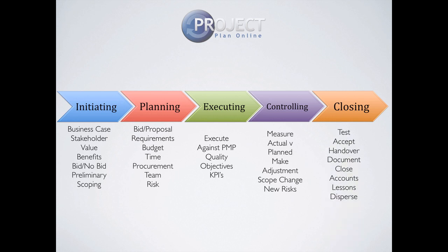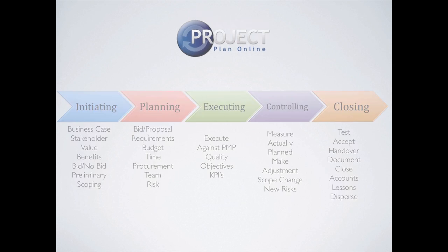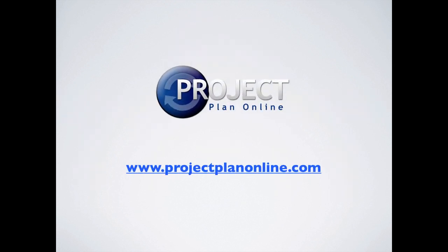Finally, you have the closing stage. This is where you would test the product, seek acceptance and hand over with the client. You would document the outcomes of the project, close all the business accounts, learn lessons and disperse your project management team back to where they came from. So there you have it, quite simply, the project management lifecycle.